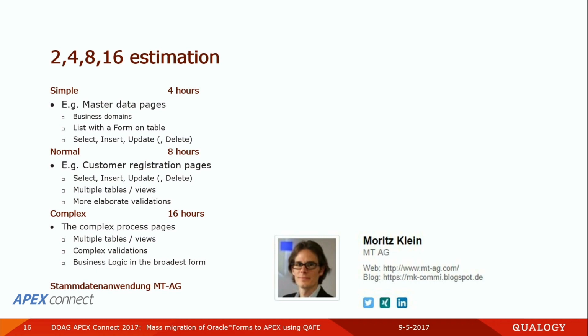And what I want to do, of course, which is very, very tricky for me, because I tend to undersize an application. I always tend to say, that's simple, that's nice. But that's really, really dangerous, because some of them will take considerably more time than others. There are pages that will take at least 2 or 3 days. So you will need to have some table pages estimated at 4 hours that will take only 2 or less.